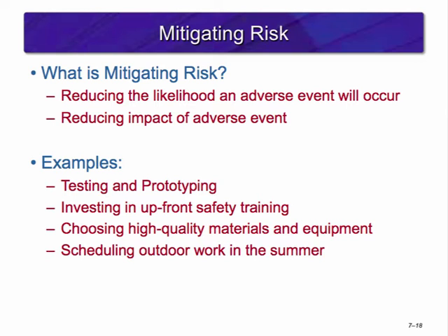An alternative mitigation strategy is to reduce the impact of the risk if it does occur. Sticking with the software example, developers will often implement code as a redundancy in case a portion of the code does fail. If the original piece of code becomes a problem, the redundancy code kicks in to cover for the original piece, providing a seamless experience for the user.